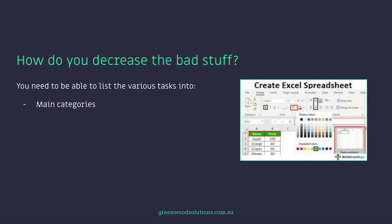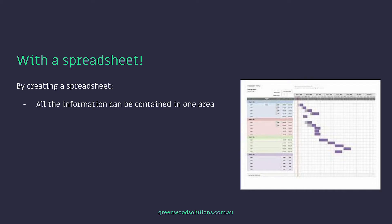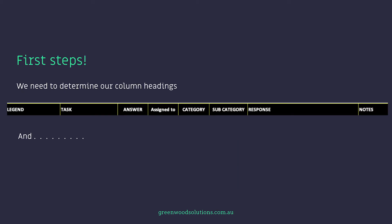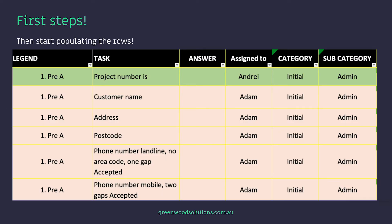So how do you decrease the bad stuff? You need to be able to list the various tasks into some categories — main categories, some subcategories, the name of the task, ideally who's assigned to it, the answer, and the response. How do you do that? With a spreadsheet. By creating a spreadsheet, all the information can be contained in one area. If you convert the information to a table, you can filter that information, and you can also create Gantt-type functionality — a Gantt chart. The first step is to determine your column headings and start populating the rows.